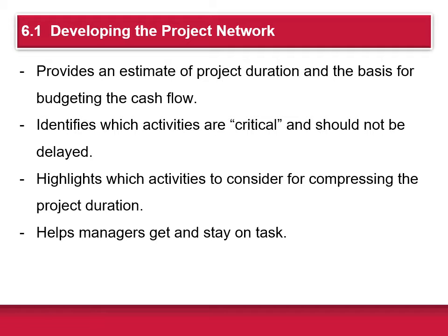In addition, the project network provides an estimate of project duration and is the basis for budgeting the cash flow of a project. It identifies which activities are critical and should not be delayed. It highlights which activities to consider for compressing the project duration, and it really helps managers get and stay on task.